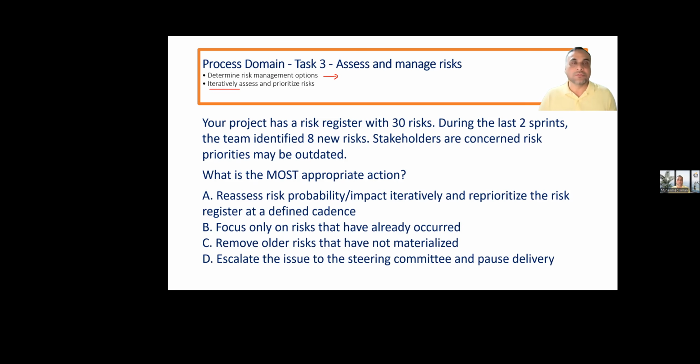Once we identify the risk, we can use expert judgment, SWOT analysis, and Delphi technique to identify the risk and provide responses. We can use benchmarking, industry standards, and industry journals. We can use prompt lists like PESTLE, TECOP, or VUCA. We can use a risk breakdown structure and affinity diagrams. I think I told you there are 37 plus tools and techniques we normally discuss to identify the risk. After identifying the risk, we put them in a document called the risk register.